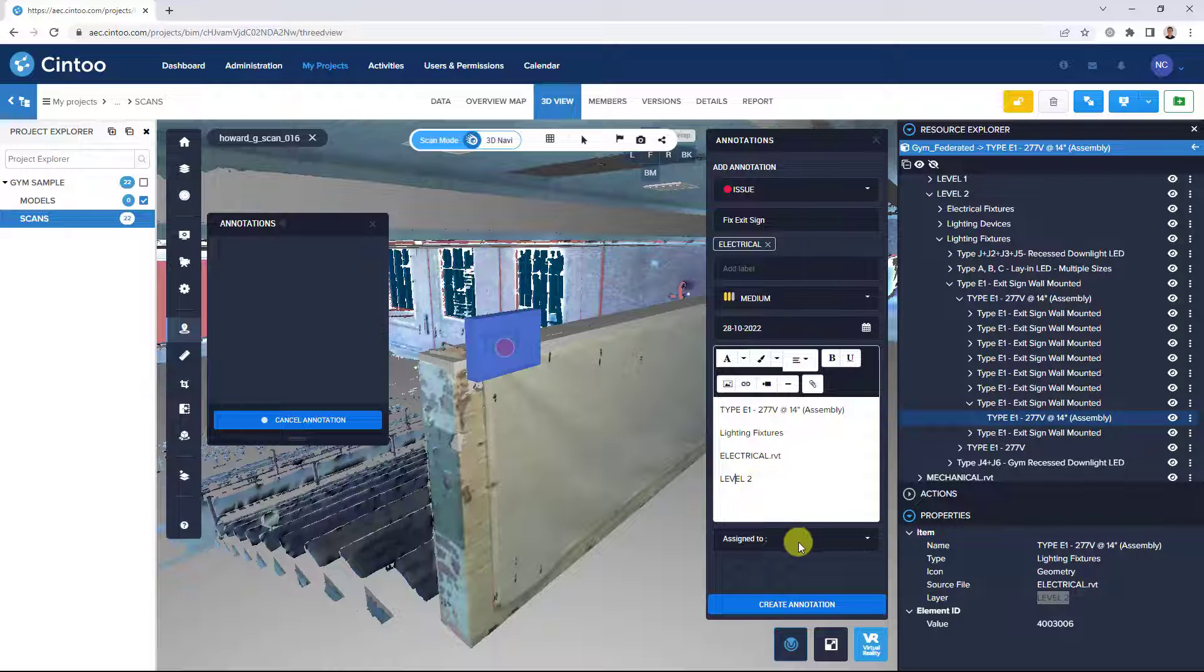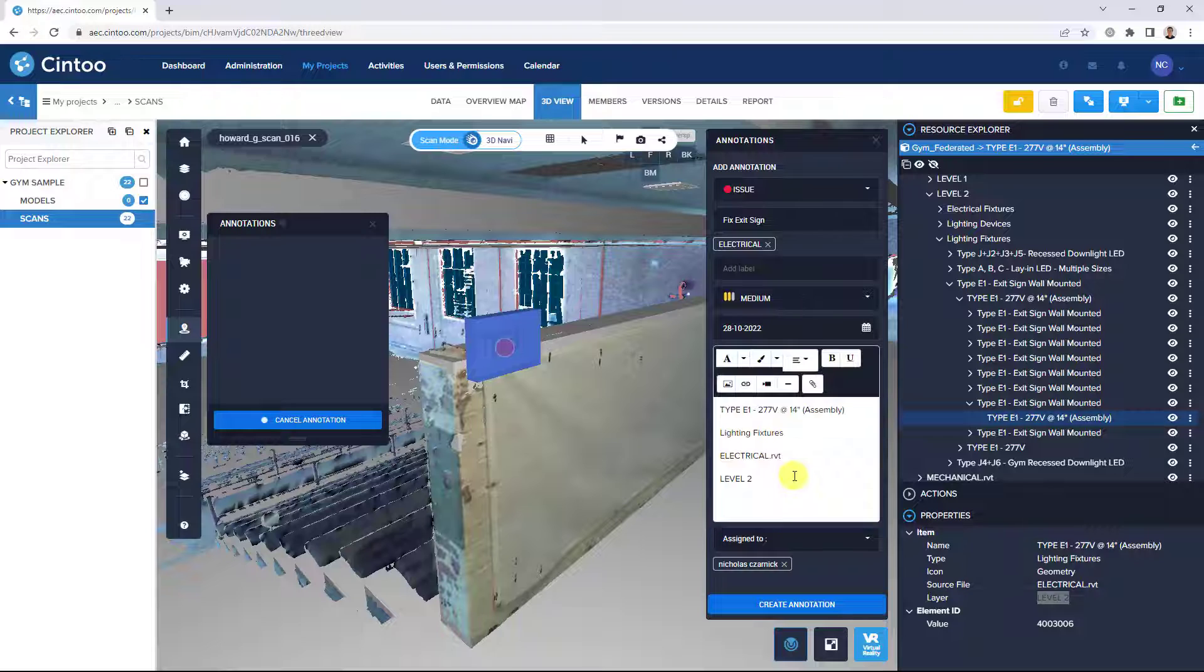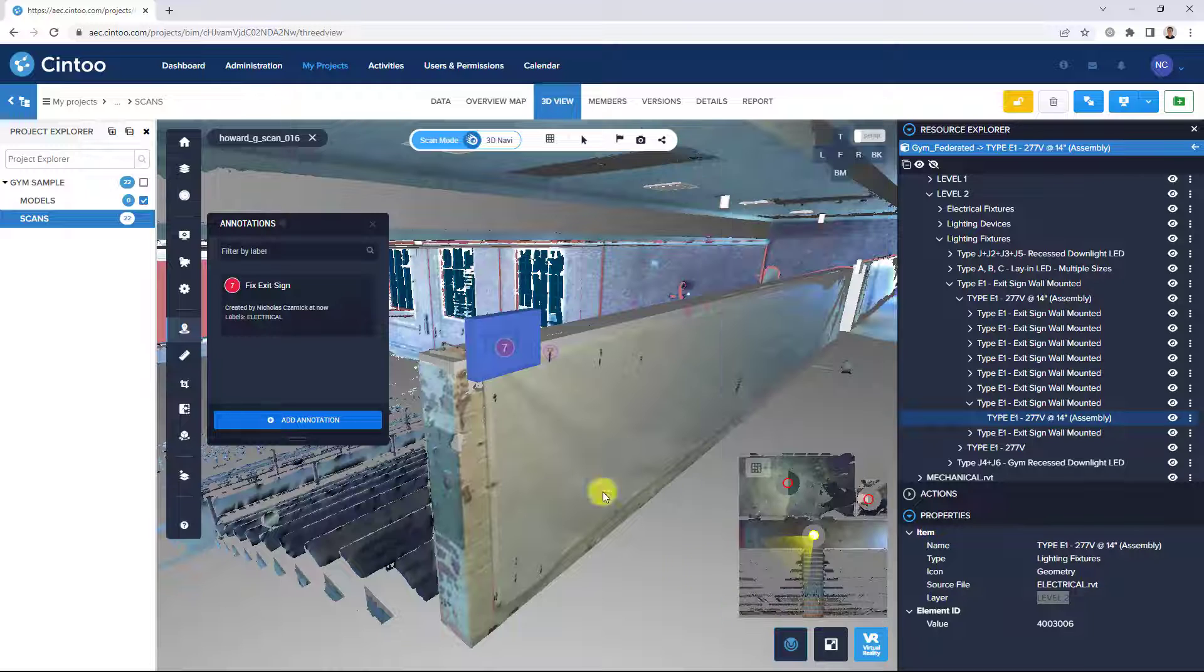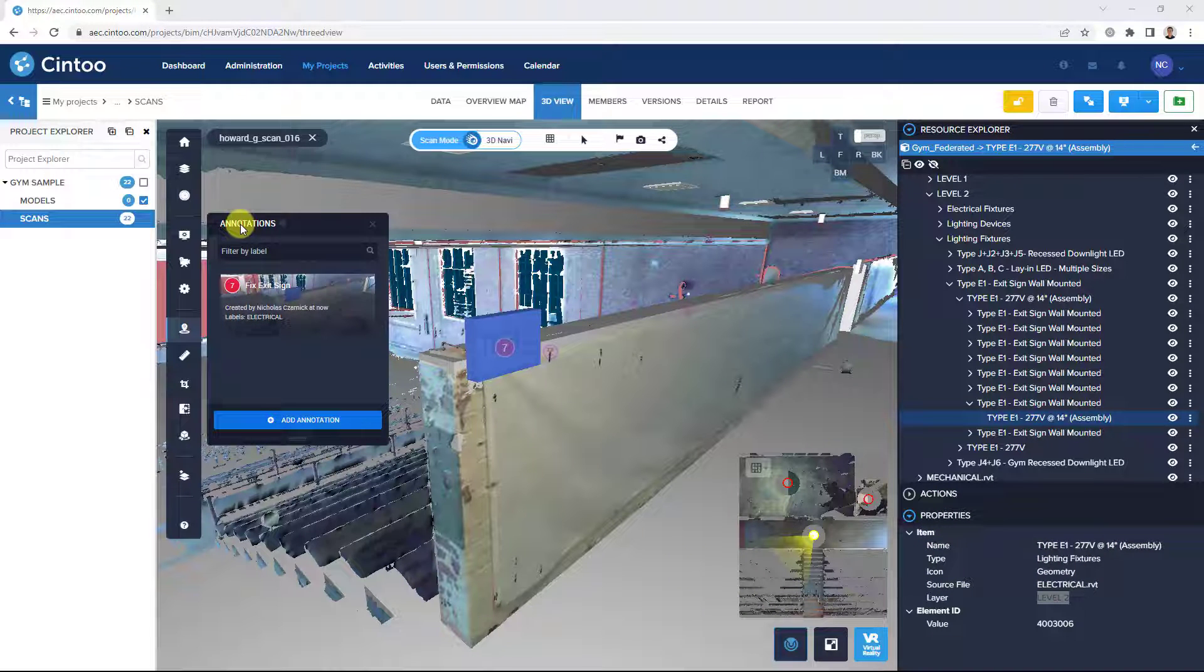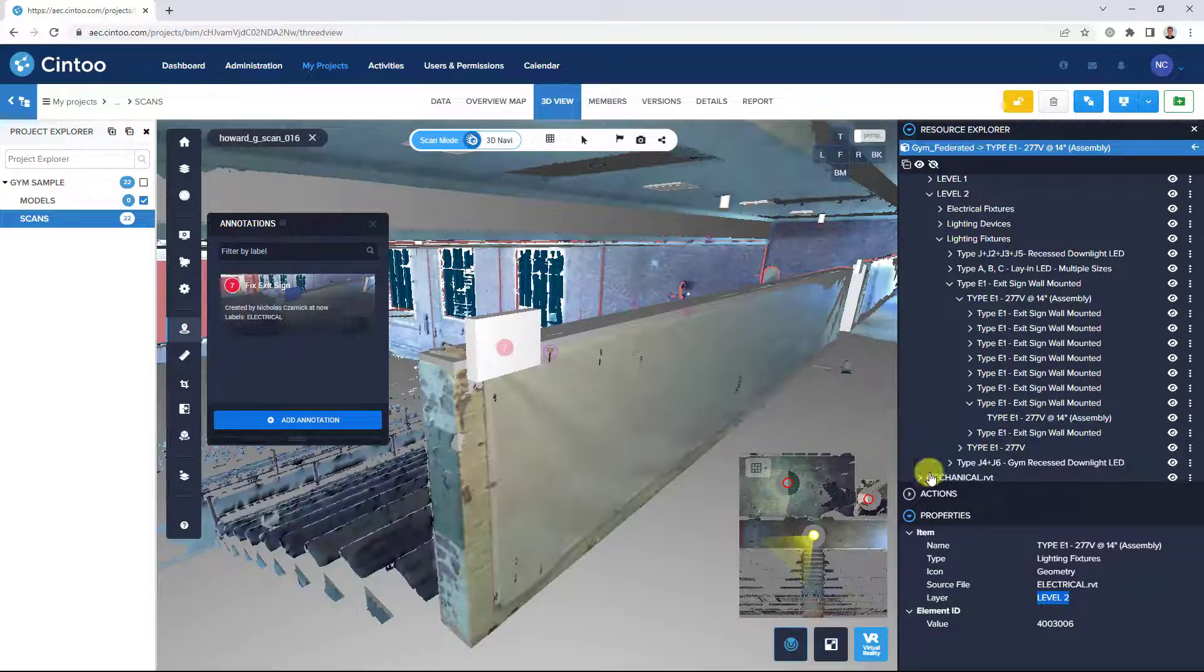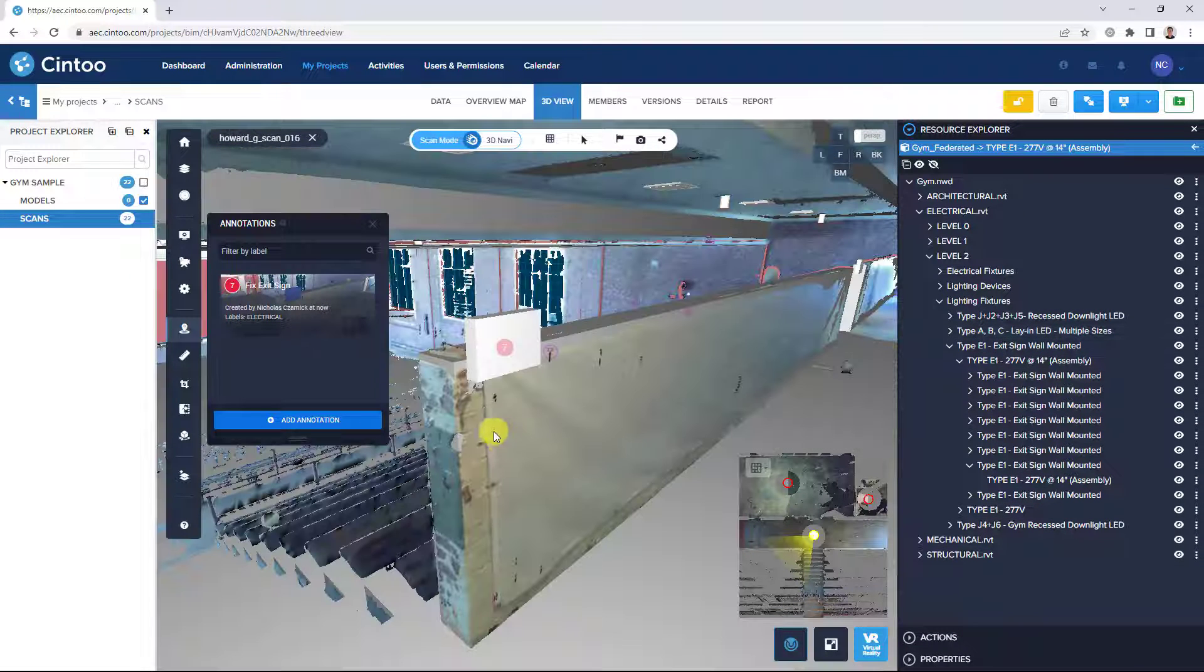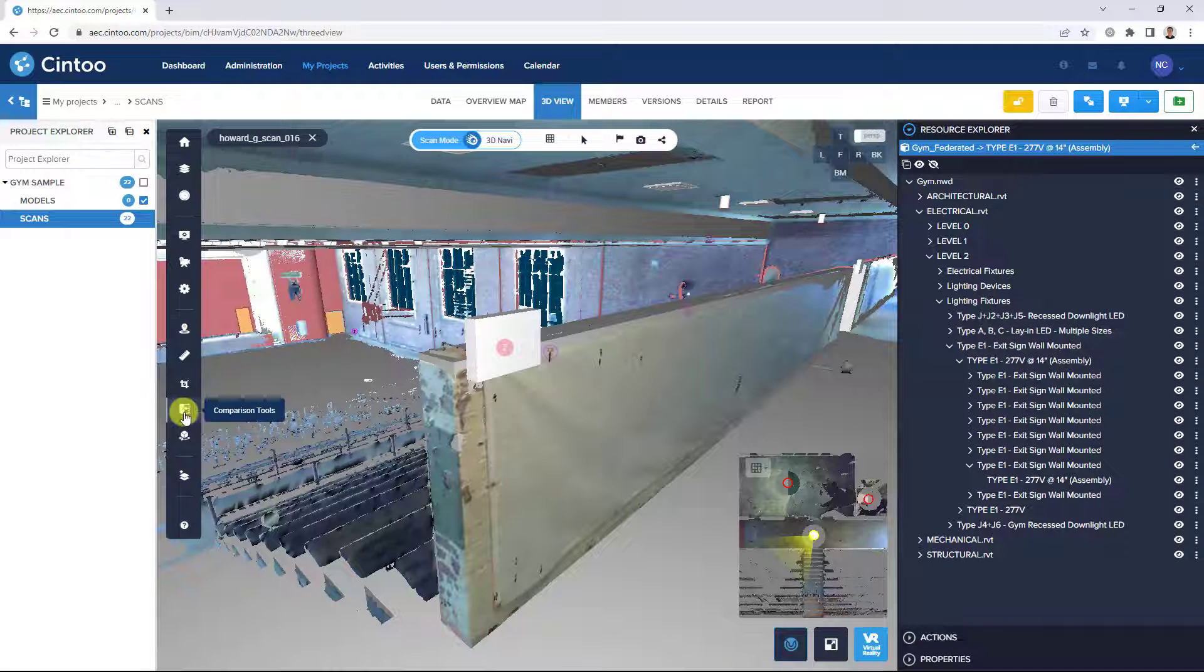And then we can assign it to another project member. When we click create annotation, it will save the issue to our annotations list. And we can continue this process of navigating through the project and identifying issues using our comparison tool.